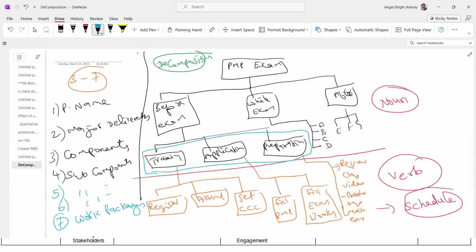The lowest level of the WBS is one level prior to the activities, known as work packages. Assume your WBS has only 5 levels. Then the 5th level is the work package. Whatever number of levels you have, the lowest level will always be work packages. Why are work packages important to know for the PMP examination? Planning usually is done at the work package level. You may have n number of activities.